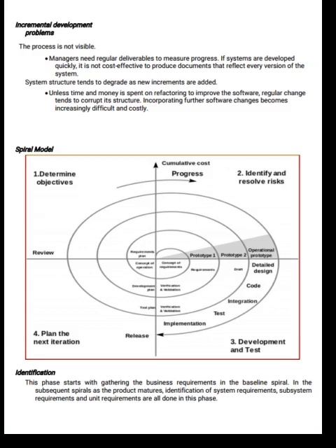Let us see incremental development problems. The process is not visible. Managers need regular deliverables to measure progress. If systems are developed quickly, it is not cost effective to produce documents that reflect every version of the system.